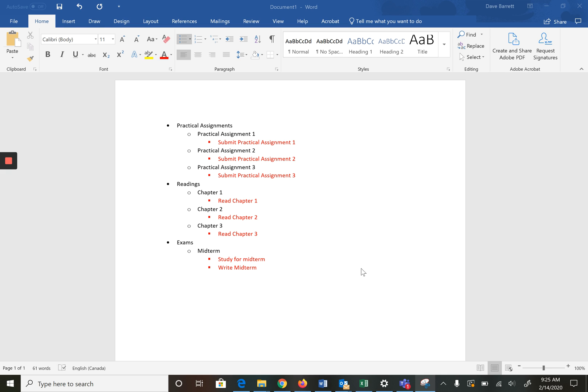In black you can see my work breakdown structure or at least a partial one. I had it broken down by practical assignments one, two, three and there would be more, readings chapter one, two, three and there would be more, and exams I've got the midterm.